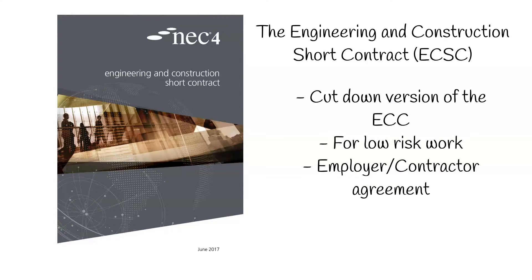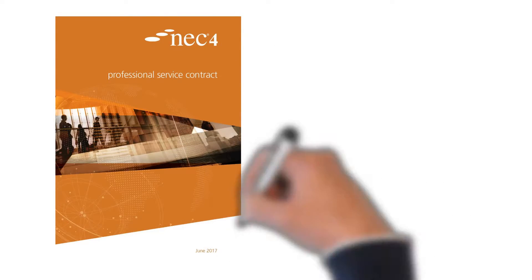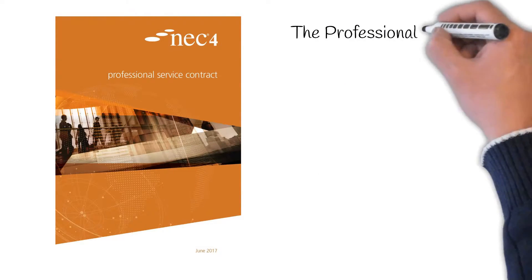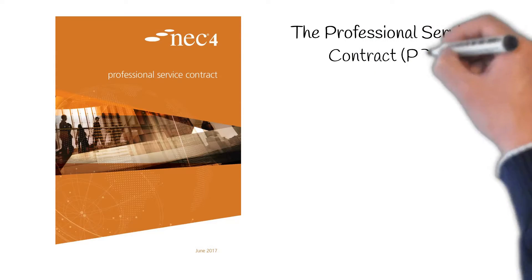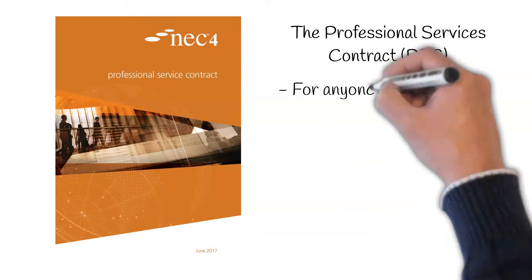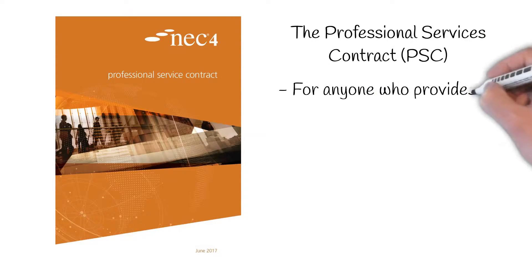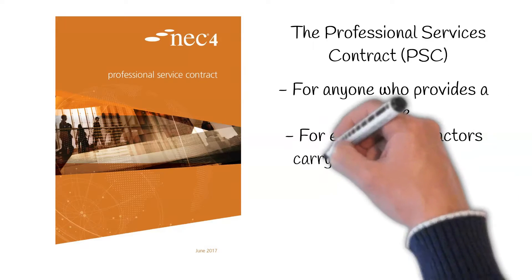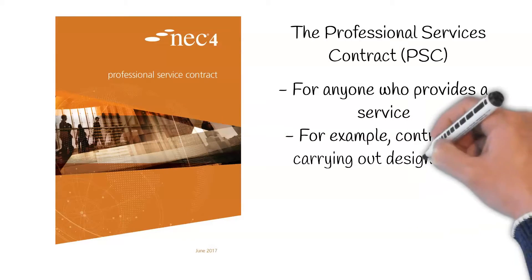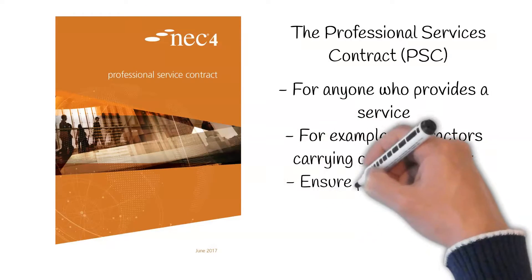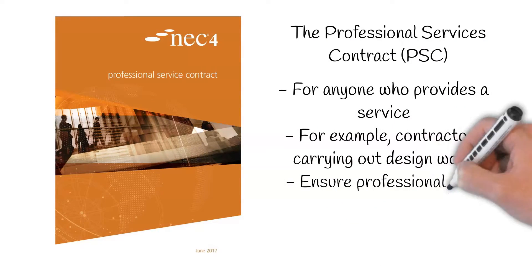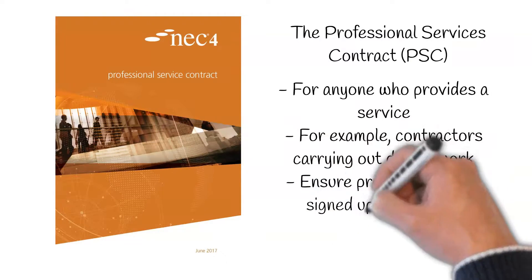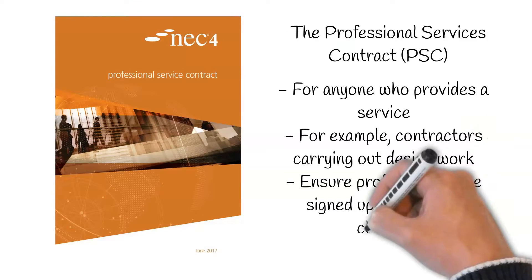The Professional Services Contract, or PSC. This is to be used for anyone who provides a service, for example, contractors carrying out design work. This ensures that although the design is produced for a contractor or employer, they would also be signed up to follow the clauses within the contract.